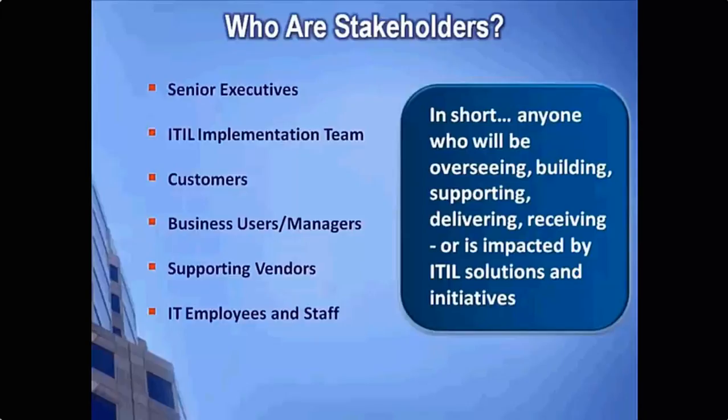And the reason for that is you are implementing processes and behavior change, whereas software, which a lot of us in IT are used to implementing, it's pretty clear when the software is installed and running. It's not so clear if your process is in place and people are using it. So we're going to have to manage our stakeholders very well in terms of their expectations, helping them change behavior and starting to adopt and adapt and transform to an ITIL and IT service management way of operating.